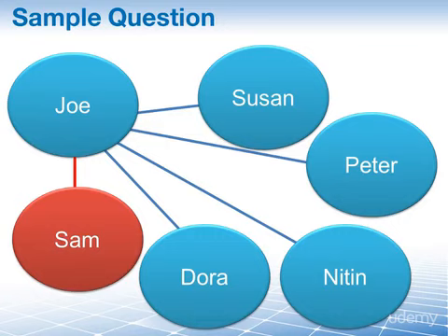Well, it's quite simple if we apply the formula. Remember, n times (n minus 1) divided by 2. And I said it's really simple if you know what n is. In our particular case here, n is 1, 2, 3, 4, 5, 6. We have 6 people on our project. So it's 6 times (6 minus 1), which is 5. So 6 times 5 is 30. We divide that by 2. We have 15 channels on a team with 6 people.